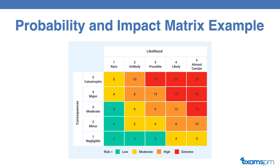Now let's take a look at an example of this matrix. Here we have a probability and impact matrix. On the rows we can see the consequences or the impact, which is ranked from one to five — from negligible, to minor, to moderate, to major, and catastrophic. On the columns we have the likelihood — how likely this risk is to occur — also ranked from one to five, with one being rare and five being almost certain.